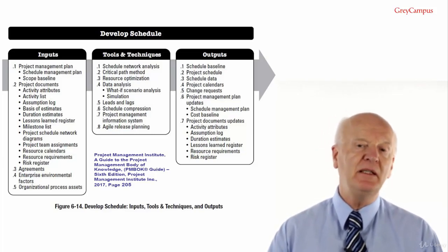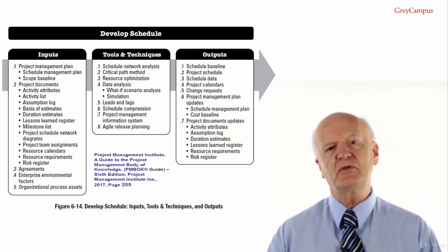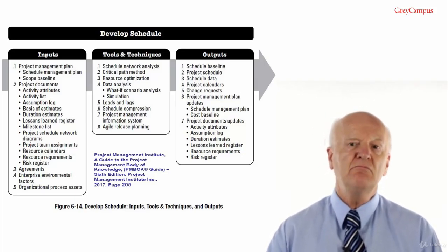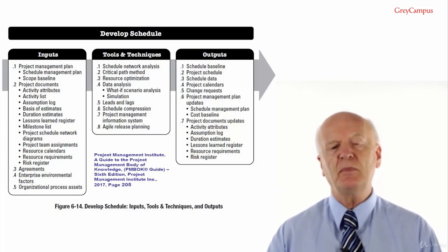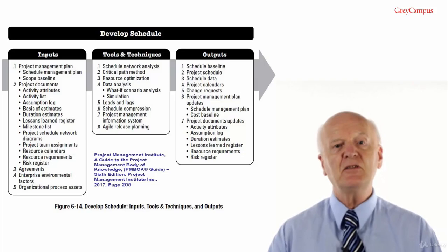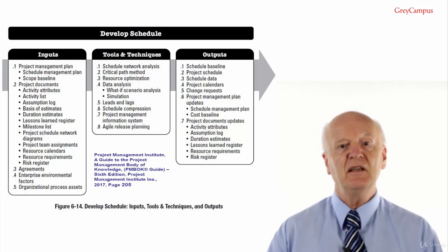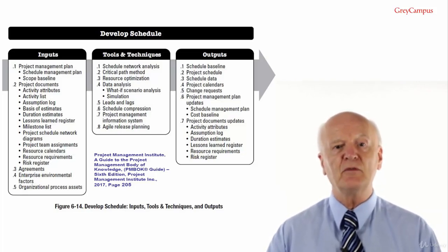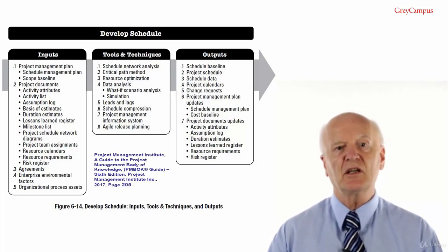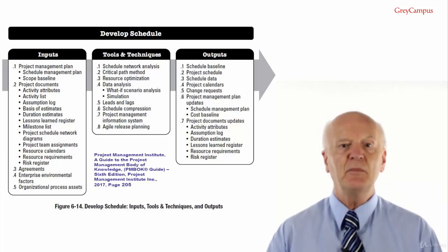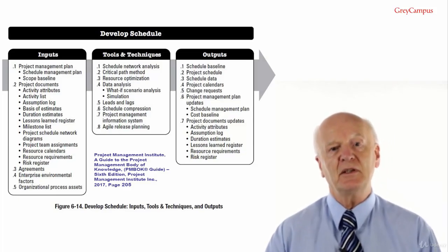This one may not be immediately obvious because you want to finish the project in the shortest time possible. You might think you would want to take the shortest path. But when you think about it, if the critical path is not the longest path, then you could delay one of the activities on it without delaying the whole project. So by definition, if you can delay any deliverable on the critical path, then the entire project is delayed by this amount. The critical path is the longest in terms of sequenced activities, but the shortest in terms of total project duration. But this represents the shortest time to complete the project.